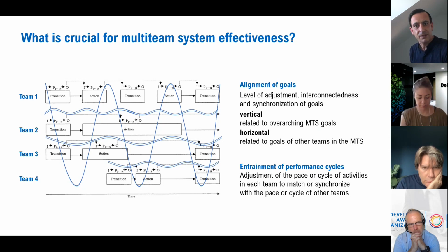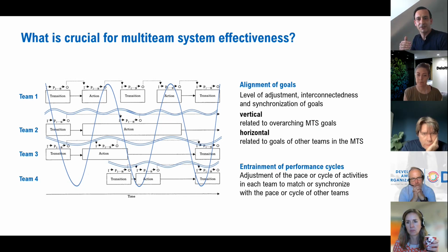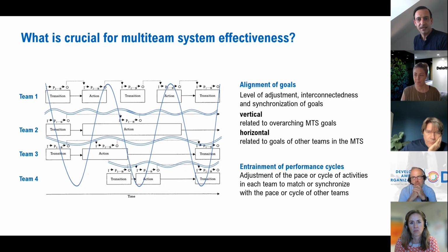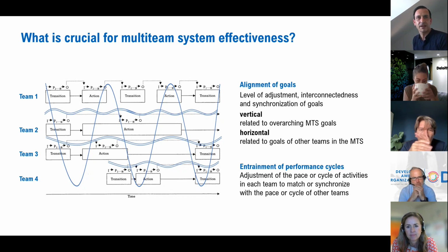When you think of Scrum or OKRs, we have these quarterly cycles, monthly cycles, weekly cycles. Since I'm in the agile context, I realize this might be the theoretical foundation of entrainment, of why you have all these very strict cycles: introducing sprint planning, doing the work in sprints, and then afterwards having a retrospective. This gives some kind of drumbeat that is really important to help the teams align on a regular basis on their goals and task fulfillment, and to understand where the other teams are.